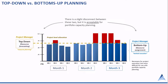There's the notion of a top-down versus a bottom-up plan. Acuity specifically takes a philosophy focused on top-down resource planning. At a schedule level, most project teams begin with a top-down plan — a high-level estimate of the start and finish dates, key milestones, maybe the dates of the phases. But as the project team digs into the details, it turns into a bottom-up schedule, understanding the activities and tasks needed, estimating against that, and then creating a realistic project plan and schedule.